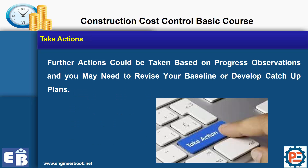The reports can give you signs to take some actions. Further actions could be taken based on progress observations, and you may need to revise your baseline or develop a catch-up plan. For example, if you find one activity is above budget and you need to finish it within budget, you can meet with your project team and agree to increase productivity somehow, or find a way to reduce material wastage — and this can be done before the project is completed and before you exceed your budget.